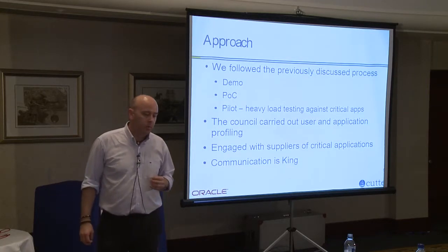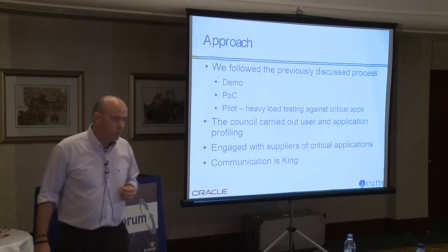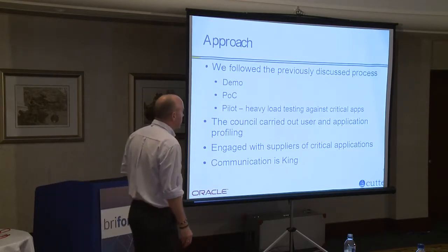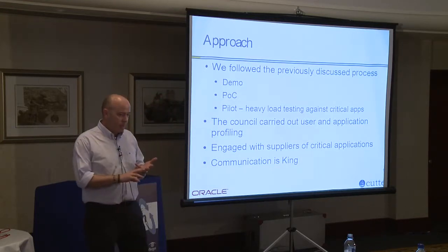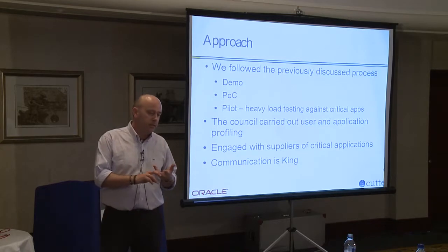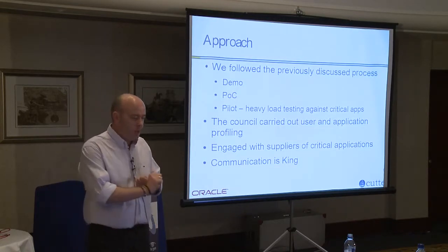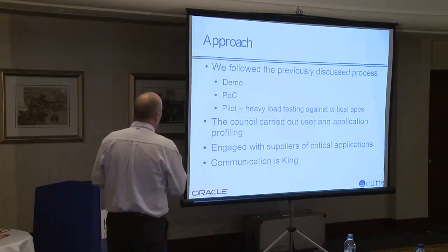And the pilot deployment actually was quite a long pilot. It ran for the best part of 5 months. During that process, there was a huge amount of testing done around diverse users, application flexibility, and disaster recovery. Then right at the very end, before they decided to place the order for all of the kit, it was put under heavy load testing against critical apps.